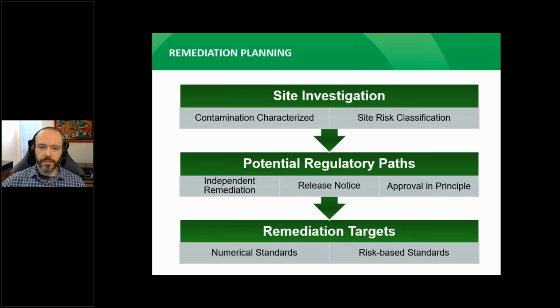Remediation targets based on risk-based standards allow the responsible person to evaluate whether contamination remaining at the site may or may not pose unacceptable risks to human health or the environment. The application of risk-based standards is an important option for sites where it is not feasible to physically remove all contamination and residual contamination will remain at the site. Remediation based on risk-based standards may be cost-effective, but it requires performance verification planning and annual reporting.